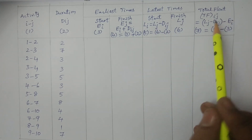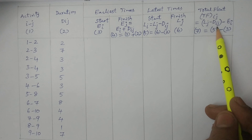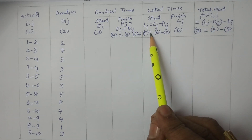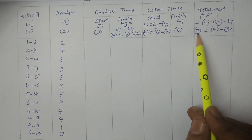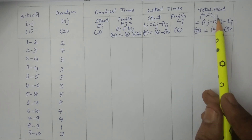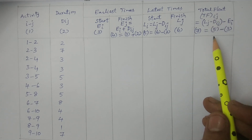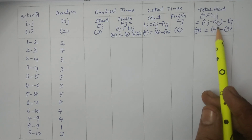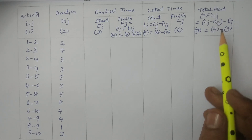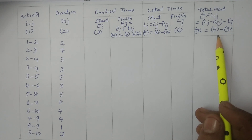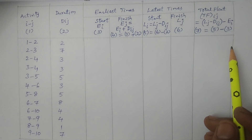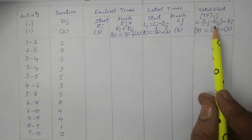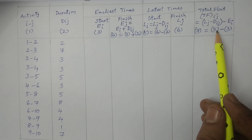Total float T(IJ) equals LJ minus DIJ minus EI — that is, fifth column minus third column, giving the seventh column. Total float is a very critical, crucial part. If the total float is zero, then it forms a critical path. Total float gives the critical path.